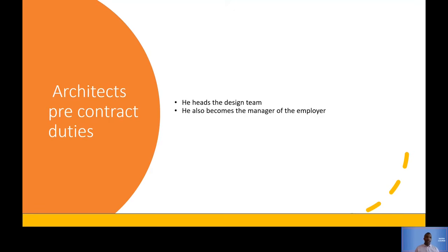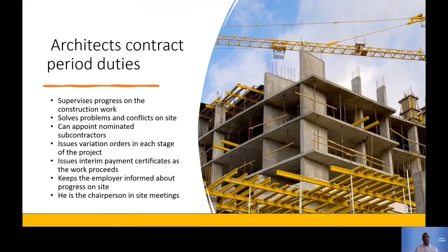Now, during the contract period, remember I said contract means during the construction period, the architect supervises progress on the construction work, because he's the one who knows the design more than anyone else. So he needs to supervise to see if the contractor on site is actually building according to the contract documents, and he's checking all the progress of how the construction work is going.